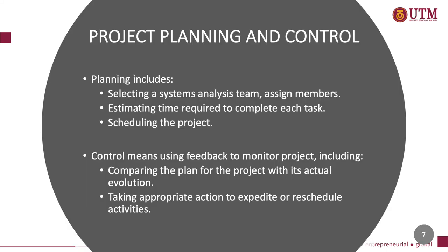When we do project planning, there are three elements that need to be clearly identified. First, the activities. Second, the people or the human resources. And third, time duration. The planned activities should be assigned to the IS team members. The specific time duration to accomplish or complete the task for the planned activities must also be estimated.